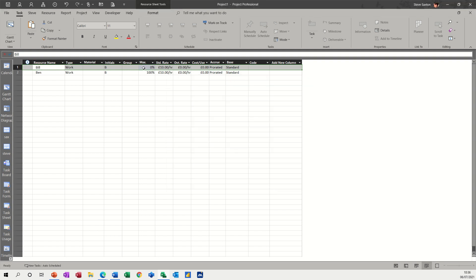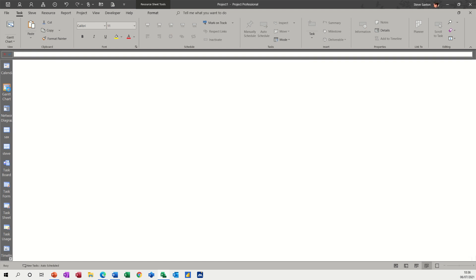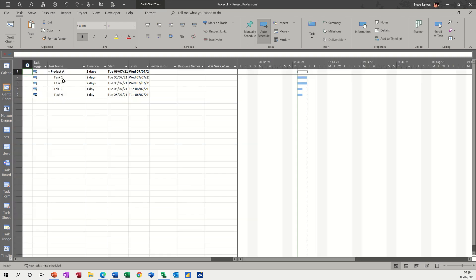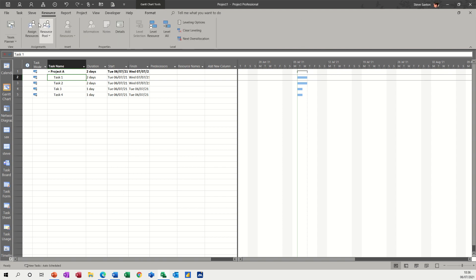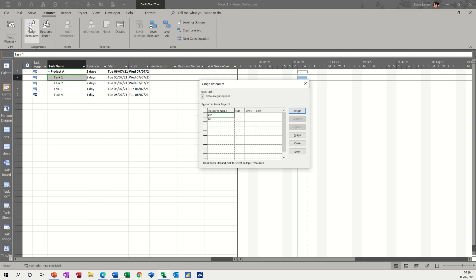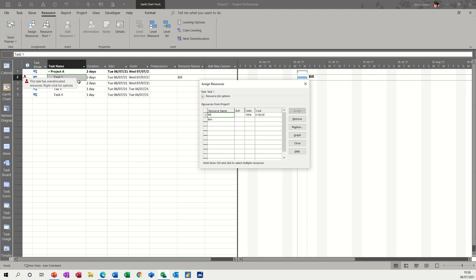On the resource sheet, it's gone to 0%, he's not available. If I go and allocate him to a task, so click on task 1, go to the resource tab, assign resources, allocate Bill, assign Bill, it's gone red straight away because Bill is not available.